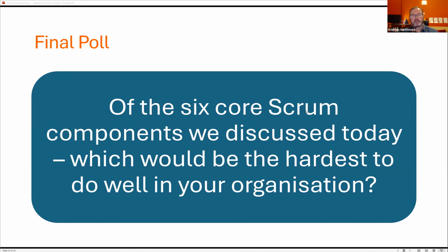I think the second part of the answer is it depends on what they're working on. And I have seen successful situations where high-performing teams are working on user stories that occur over multiple days. And if the team is well self-organized, you have situations where team members are already interacting with each other. They're already communicating. They're running a shared comms channel and they're sharing their ideas throughout the day, and that's working smoothly. If a Scrum Master sees that happening, then you could go for alternate days.